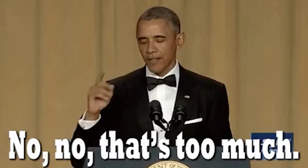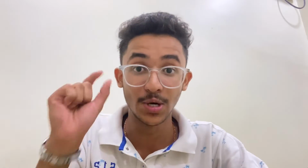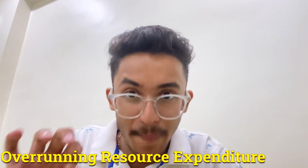Find out what's causing the cost to balloon. Is it because your team is submitting too many change requests, triggering a contract clause that allows the supplier to increase the price? Is it possible that something else is at work? Whatever the reason, identify it and proceed from there. Involve the provider as well, so they understand that you can't afford or don't want to bear those costs in the future. You may have to renegotiate the entire contract, but it's better to do it now than wait until it's too late.